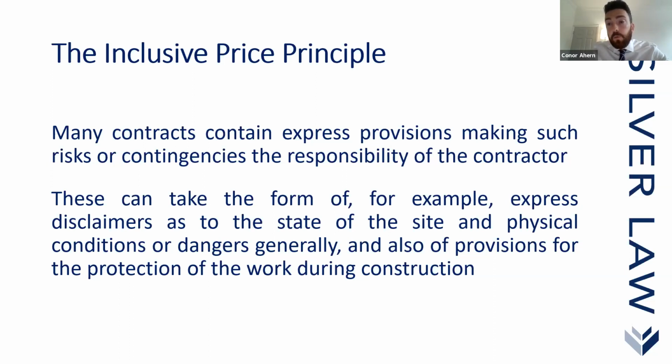The employer will provide that as part of the requirements, but in the contract, the employer would say that the contractor can use the employer's requirements, which include the ground condition schedule, but he's not entitled to rely on it as a method of working, and that the employer doesn't give any warranty as to the accuracy of that information. So what happens then is that, often it's the case, you could have a huge site, and sometimes the borehole logs are just completely inadequate. You may only have 2 or 4 borehole logs for a huge site, basically because it's a cheaper method to do it initially at the outset if the employer wants to keep the costs down.